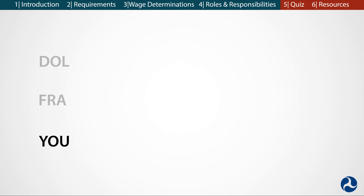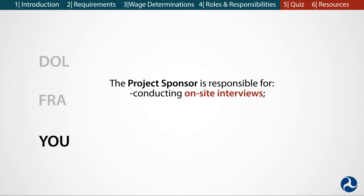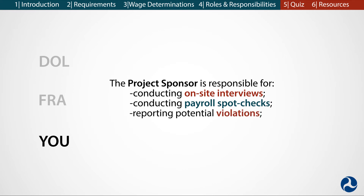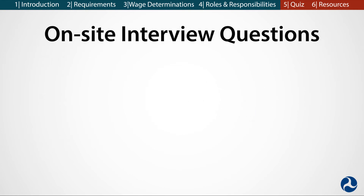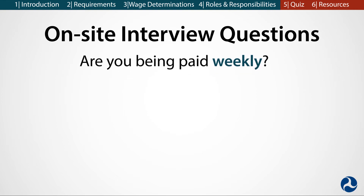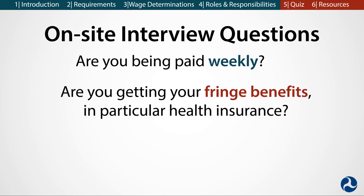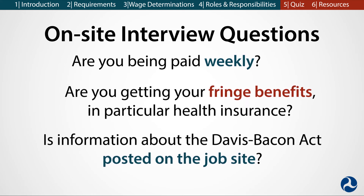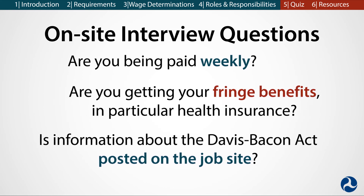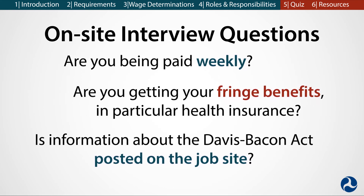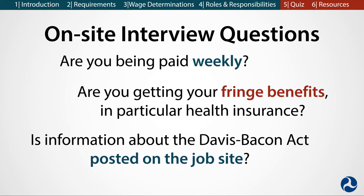The project sponsor plays a big role in following the requirements of the DBA. Project sponsors are responsible for conducting on-site interviews with laborers and mechanics, conducting payroll spot checks and reviewing related records, reporting potential violations, and maintaining full documentation. The project sponsor is ultimately responsible for these activities but may delegate them to its agent. The on-site interviews with workers that the project sponsor conducts should include questions like: Are you being paid weekly? Are you getting your fringe benefits, in particular health insurance? Is information about the Davis-Bacon Act posted on the job site? The project sponsor should document the results of these interviews.